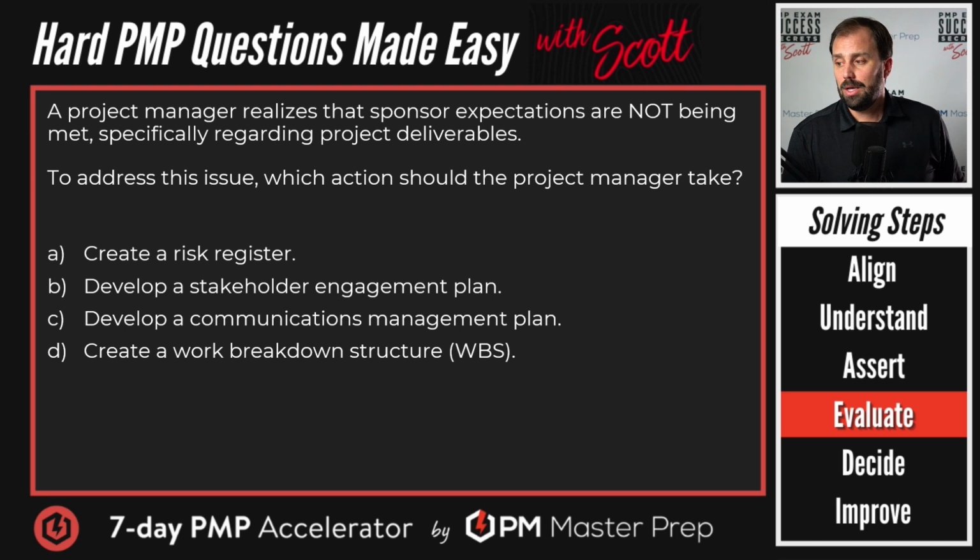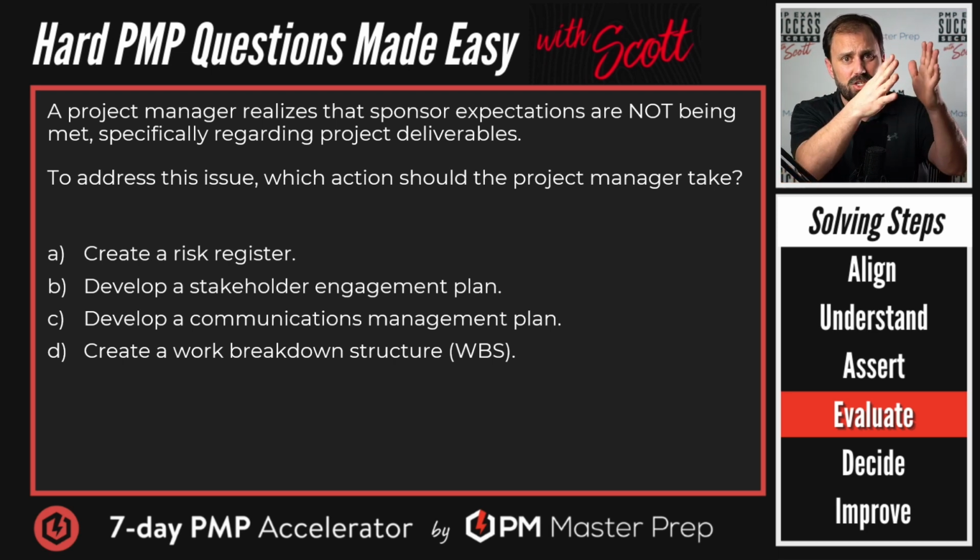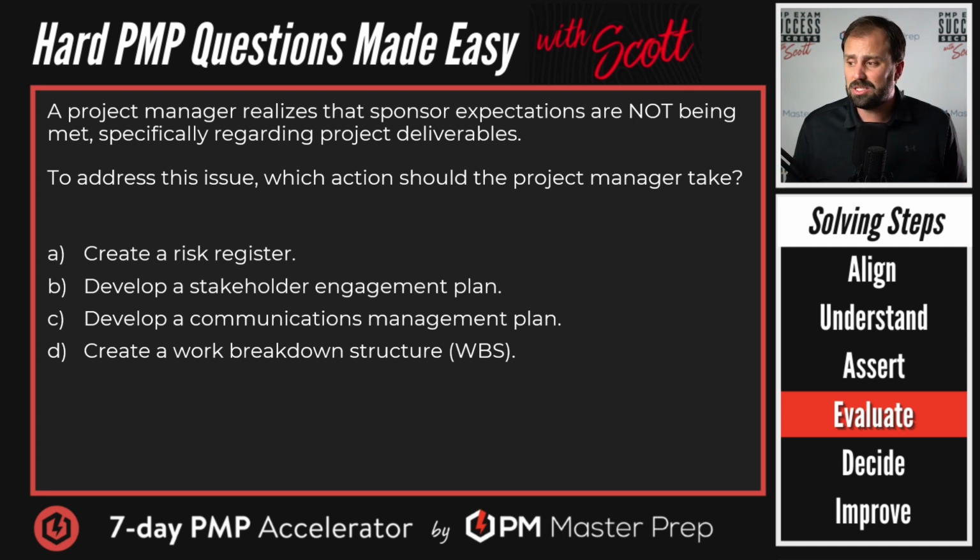All right, so yeah, this seems like a risk. But it is an issue as defined above. It's not even a risk now. It is a problem. Creating a risk register probably should have been done, but right now I don't think that answers the problem. Putting it on the issue log is a good first step, but this says risk register. So I'm going to say no. It doesn't go forth and create that level of communication and get the channel going and work through it. So no to A. I'm saying absolutely no to A. Let's kill it.